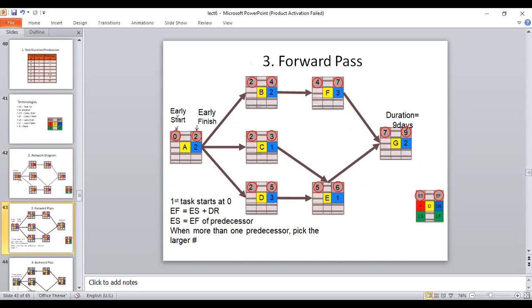So you can see here A is the first activity. So what will be its early start? A is the first activity, that means A will start from 0. Okay, the class starts at 10 o'clock, say it takes 2 hours, that means it starts from 0. So we have 0 here, and what is the early finish? It is a 2-hour class, so what is the earliest finish possible? It will be 2. The duration for that activity is 2. Is that clear to everybody?